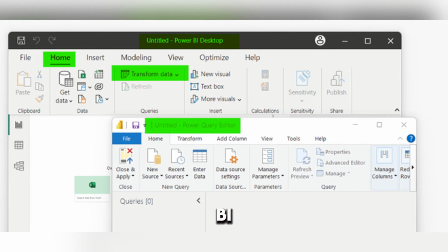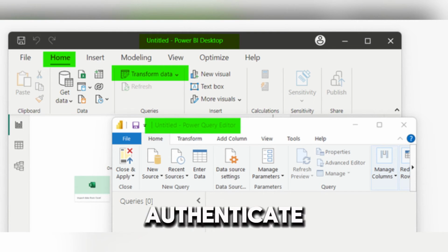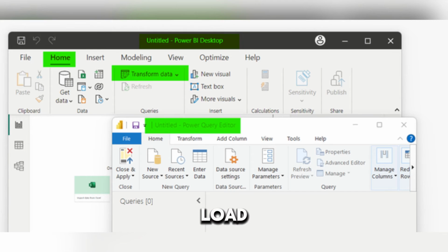Connect in Power BI. Open Power BI Desktop. Get data. Web. Paste URL. OK. Authenticate if prompted. Load data. Transform in Power Query. Filter. Merge datasets. Build visuals, for example burn-down charts.